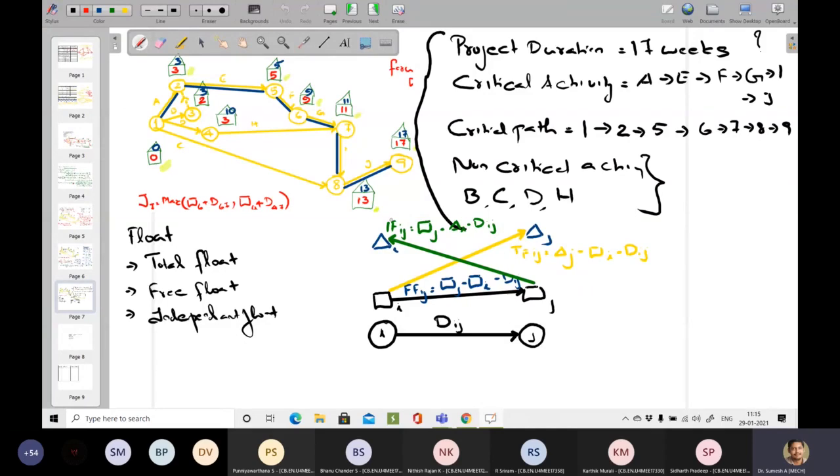Or you can start on the 8th week and finish on the 10th week. So initially, whatever resources you have in the 8th week, you can use for the other activities. Or you can delay the start by 3 weeks. So 3 plus 2, 5. Finish it off in 5 weeks. So the rest of the 5 you can use for the other activities.